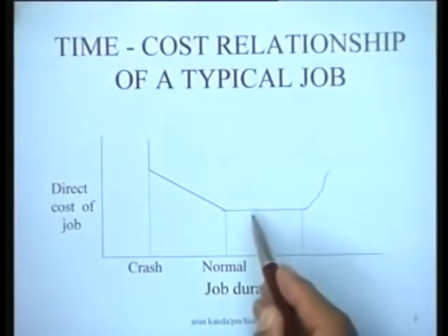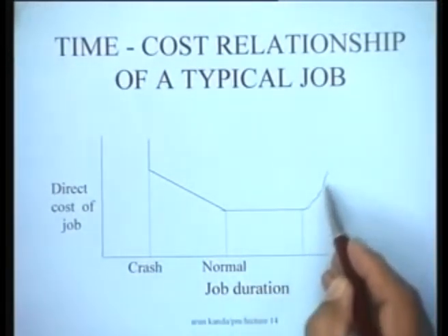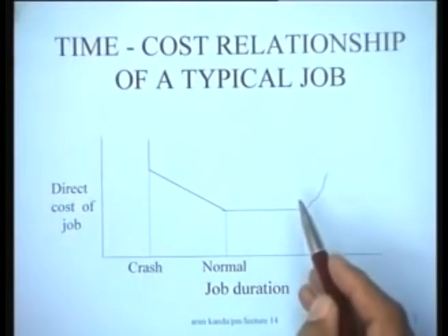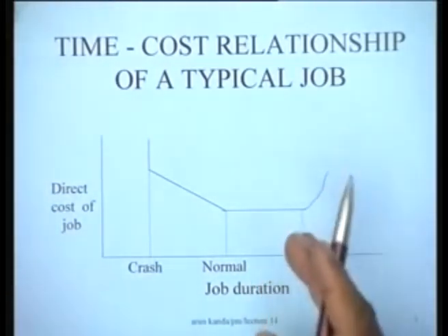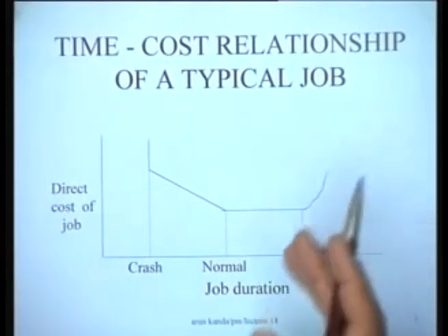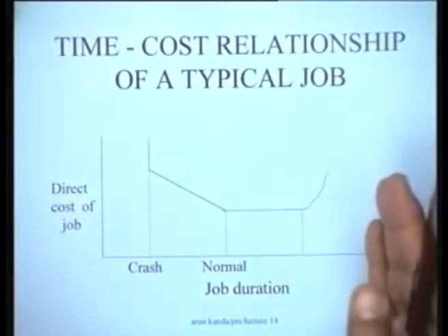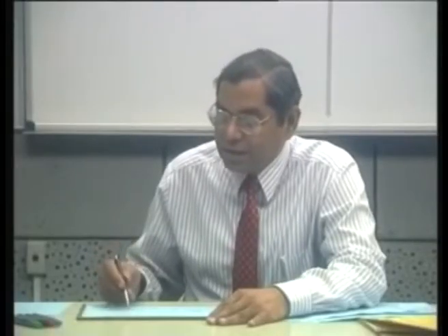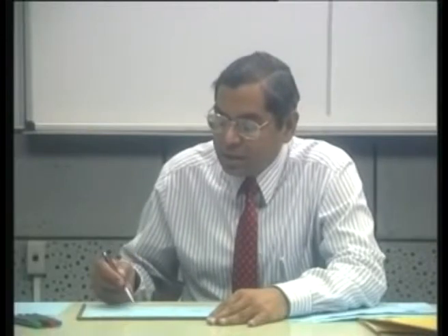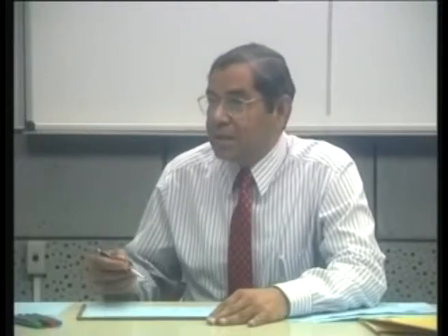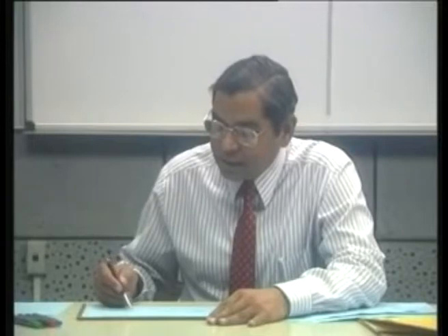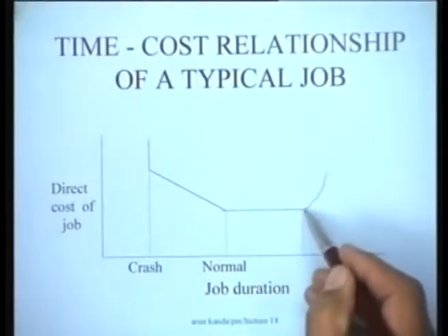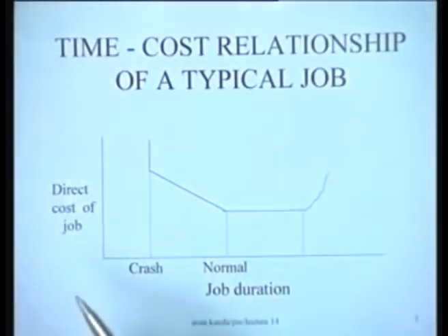If you keep on delaying the activity beyond a certain limit, the costs of performing that activity increase because of the costs associated with the delay, the deterioration of parts that you have obtained, and various other things. There could be a price escalation and things of that kind. All these things mean that if you are delaying it beyond a certain level, it becomes uneconomical to do the activity. That's the idea.